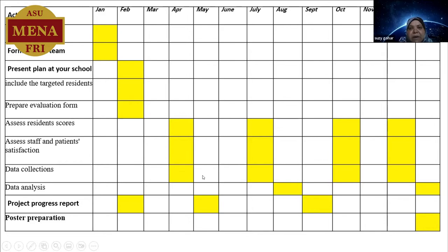Data collection was scheduled for April 1, July 1, and October 1. The data analysis was scheduled for August, and the final data analysis was scheduled for January. We need to present progress reports in February, May, and September. The last milestone was the poster presentation, which will remain in January.